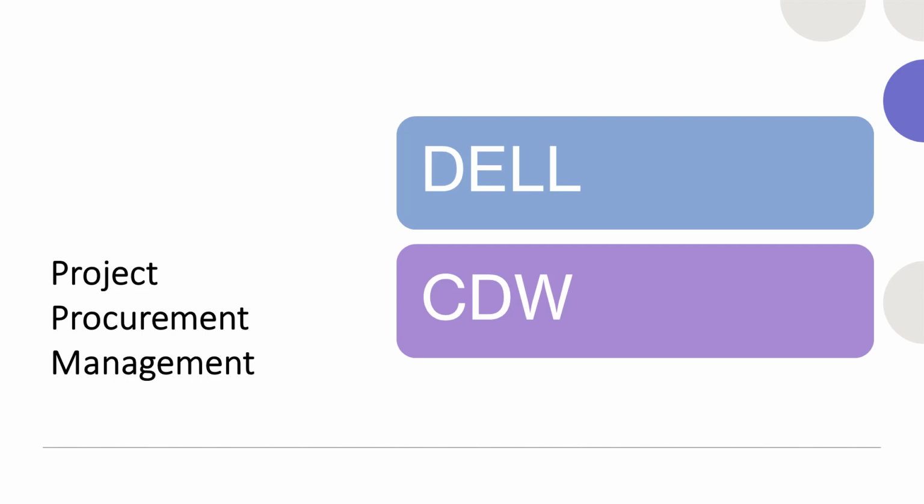Once we get their price quotes, we'll compare them side by side. These comparisons help us to figure out which one gives us the best deal, and that's how we'll start building our project budget. For our example, let's say Dell comes back with better pricing for desktops. Knowing this, we'll plan our budget based on the prices from Dell. This is how we make sure we're getting the most bang for our buck.